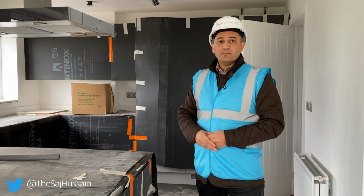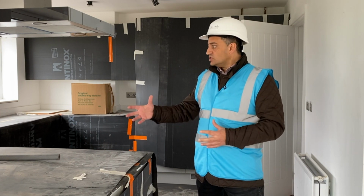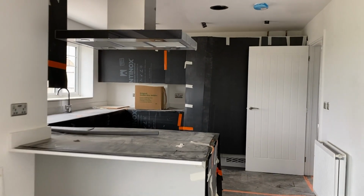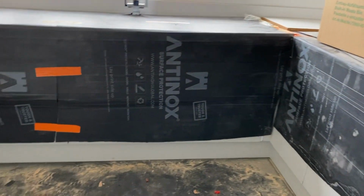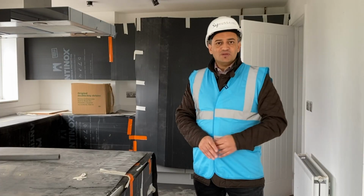This one's being customized, as I mentioned a little bit. By that I mean, because the buyer had committed to the purchase, we've made some changes for them. So the kitchen range they wanted, beautiful quartz worktops, none of which you can see because it's all under wraps right now to keep it protected and keep it safe. The reason we've got it in this state at the moment, even the Amtico floor's been laid, it's all covered up. The reason is because there's still a little bit of work that needs to be done. That work is the final commissioning, the testing of the gas, electric and water to make sure all these things work. There's no leaks, there's no shorts anywhere, and then it can be signed off. Any touch-ups can be done. The final carpets, coverings can go in as well, and then it'll be ready to hand over to the prospective buyer, with the outside being completed as well.